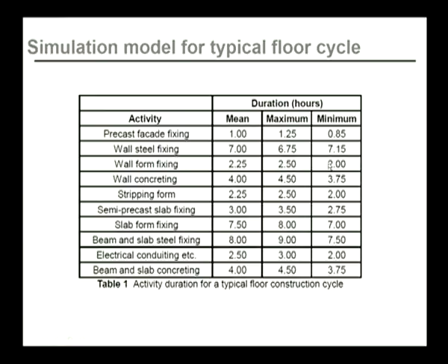So, such charts have to be prepared in which all the activities are listed with proper durations, divided into mean, maximum and minimum time required, so that we can plan and perform all the construction activities smoothly.